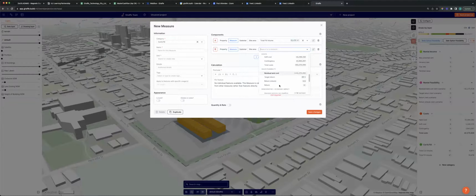Then I'll get another measure, which is the total cut volume, and we'll say fill minus cut multiplied by $5 a cubic meter. I'll do some order of operations here so this works: A less B multiplied by 5. And we'll call this cut and fill cost estimate. The unit is dollars. Probably underpriced this significantly, but that's where we're going to be right now.